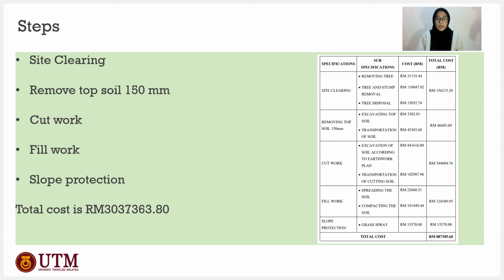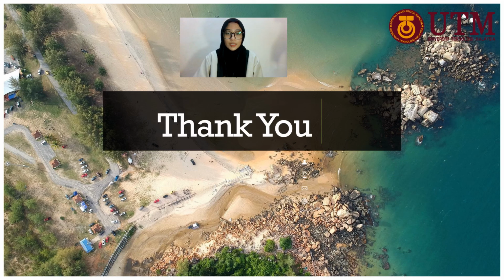From the project, we estimate the total cost of both initial and new proposed level from site clearing, excavation of topsoil, cut and fill, transportation and compaction. All these considerations include the machinery and operator costs. By implementing the strategy obtained from the value engineering, we achieved a 21% overall cost reduction with an initial cost of 3,856,958.34 ringgit and the final cost of 3,037,363.8 ringgit.